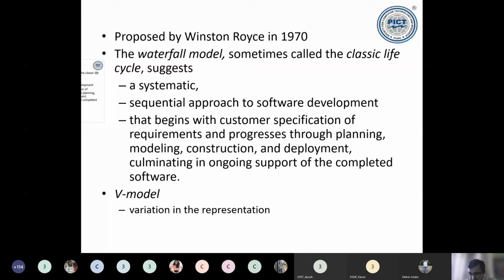Second case: if you spend some 5% to 10% of time, you will see that the over-costing that may occur subsequently will be reduced. It will be just, say, 50 to 60%, and if you spend around 10 to 20% of time, it will be reduced to say 10 to 20%. But it is not zero.